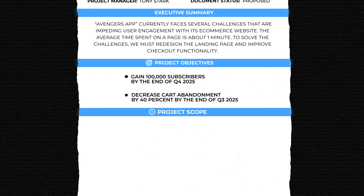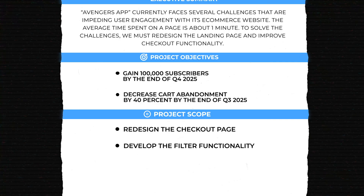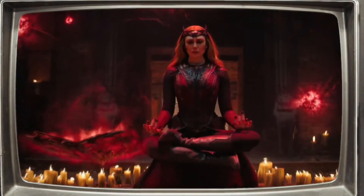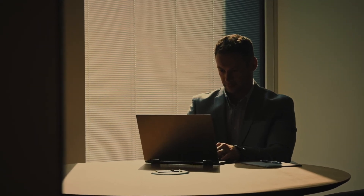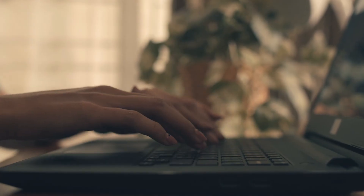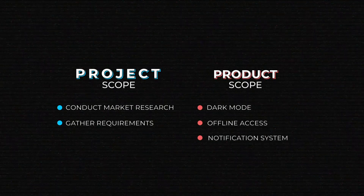Similarly, the software project scope can list tasks like 'redesign the checkout page,' 'develop the filter functionality,' or 'integrate with the review platform.' You have to keep the balance — be detailed enough to cover all the tasks to be done, but avoid going down the rabbit hole of the smallest activities. Also, don't confuse Project Scope with Product Scope. The Project Scope is broader and might include pre-development tasks like 'conduct market research' and 'gather requirements,' while a Product Scope is basically a list of features to be developed.